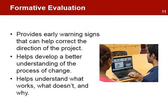Formative evaluations occur during the life of the project. They provide feedback to guide the project and make the necessary corrections, providing early warning signs that can help correct the direction of the project, develop a better understanding of the process of change, and find out what works, what doesn't, and why. Formative evaluations focus mainly on the processes the project uses to achieve expected results, looking at efficiencies in inputs, activities, and outputs. At the time formative evaluations are made, the project might not have realized outcomes to be evaluated, but the evaluations will test the validity of the initial project assumptions.